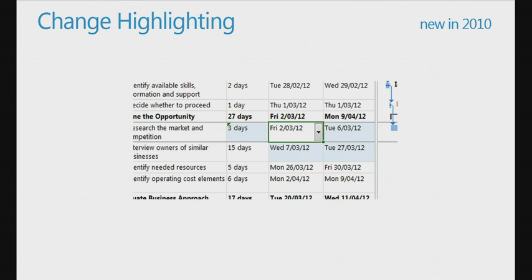This allows, when you update, for instance, a date and it has dependencies, any other tasks that get pushed aside because they've been automatically scheduled, their information will all update and it will highlight temporarily in a color so you can know what's changed. In the past, that was quite weird when you updated a schedule and then, okay, I know something changed, but...